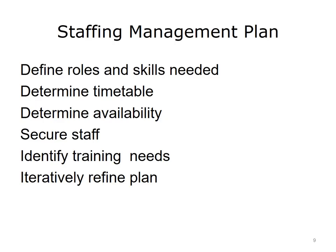Fifth, identify training needs. If your project staff needs to develop new skills, you must identify these needs and procure the appropriate training. This is particularly common in high-tech and other industries with rapidly changing tools and skill sets. Sixth, iteratively refine the plan. As the project progresses, be sure to stay on top of how staffing needs may change so you can keep the project team dynamic to ensure project success.